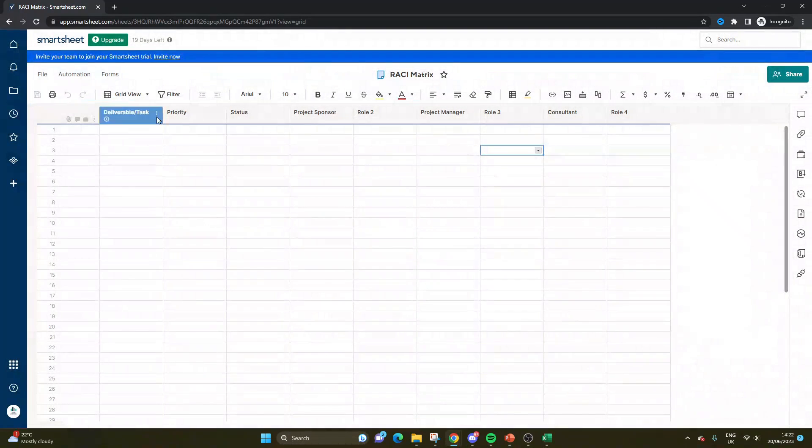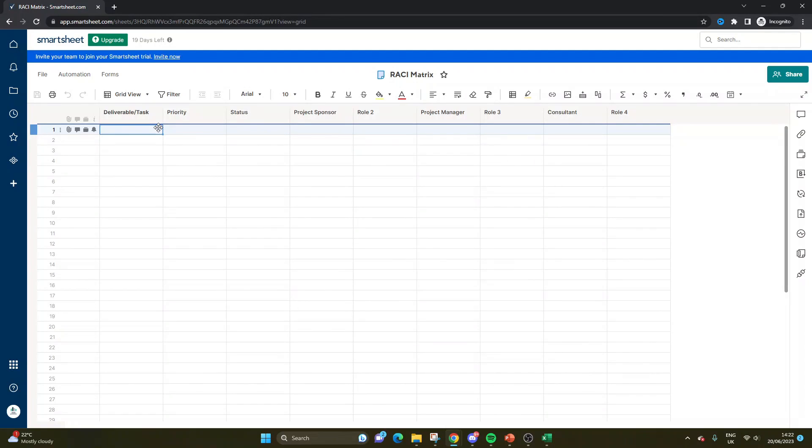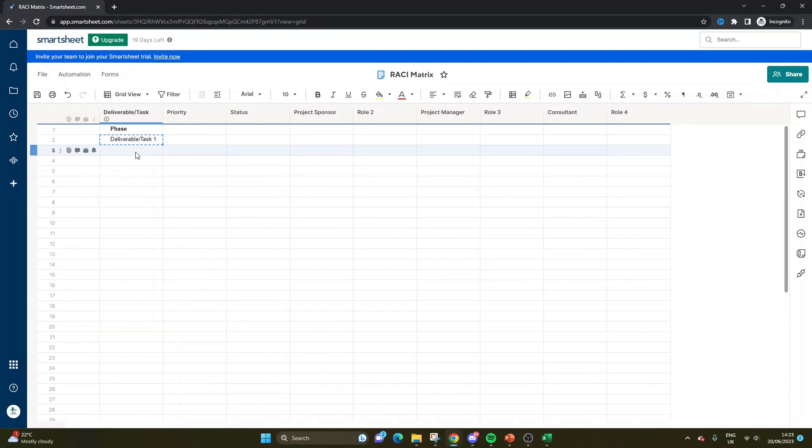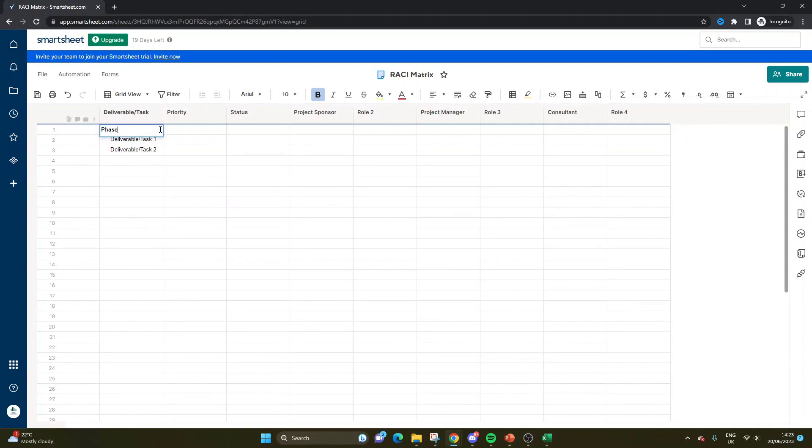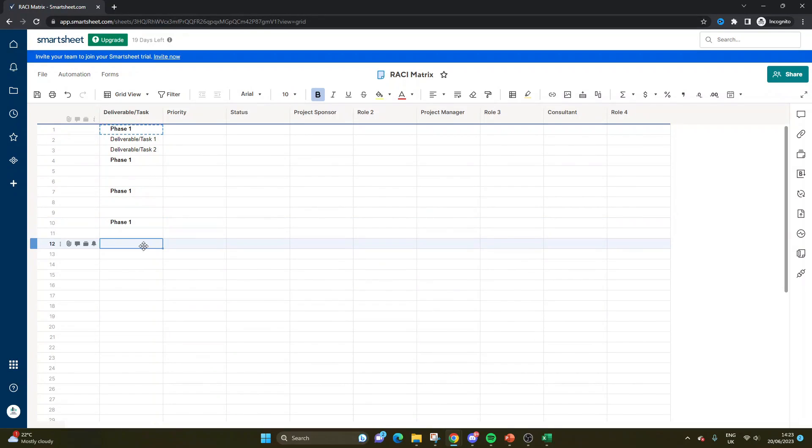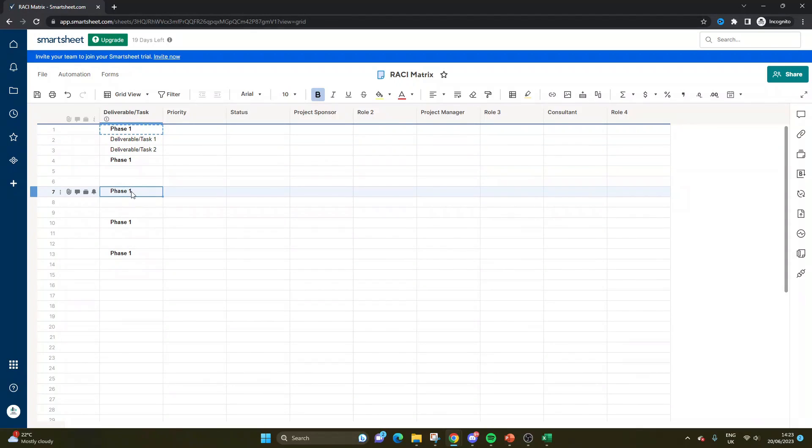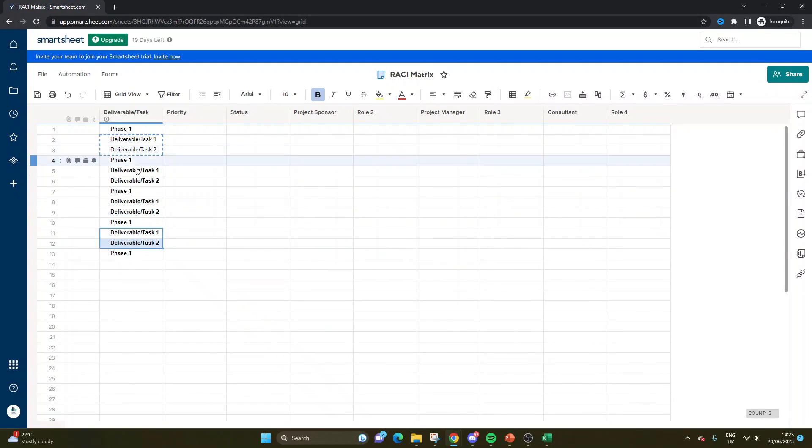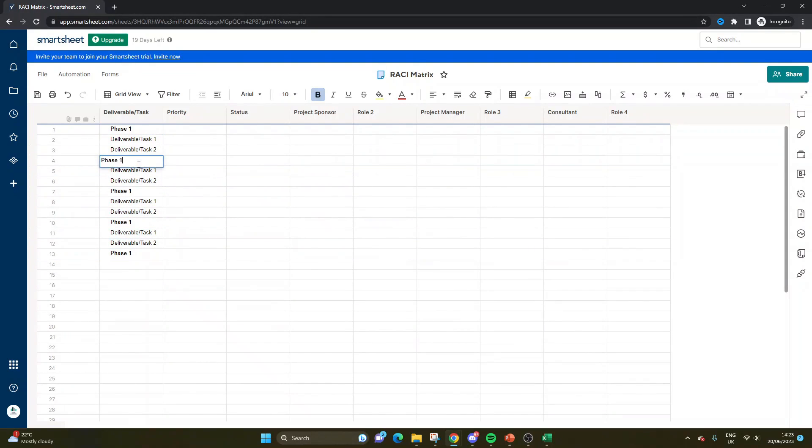Before I do that, let's put in a couple of phases. So we could put phase here. And then we could put deliverable slash task one. I'm going to unbold this, control C, control V, put this as task two. I'm going to put a new, so this would be phase one. So this is how you'd break it down via the different components of your project. So these could be project stages as well. So this could be project initiation. You know, this could be project execution. This could be project closure. You get the idea. I'm just trying to show you how this would work in theory. So I'm just going to press control C. And I'm pressing control V. So we don't want this bolded, but we do want the headers bolded. So this would be phase two. This would be phase three, four, and five.